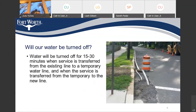Will our water be turned off? Water will be turned off for a 15 to 30 minute interval when service is transferred from the existing line to a temporary water line, and when the service is transferred from the temporary water line to the new water line. The temporary water line will be laid in the gutter with a line that ties in just past your meters — it takes about 15 minutes to make that connection, and that's the amount of time you'll be out of service.